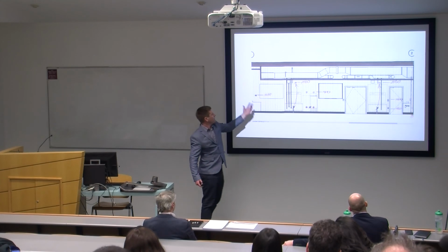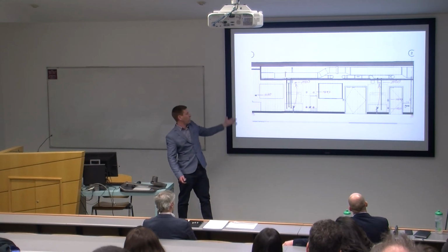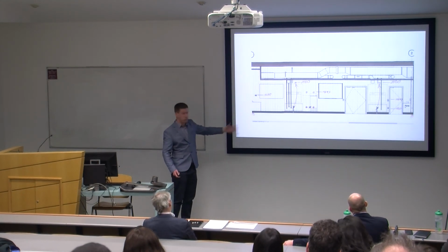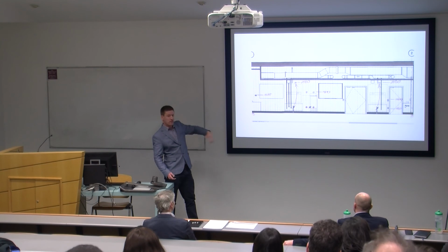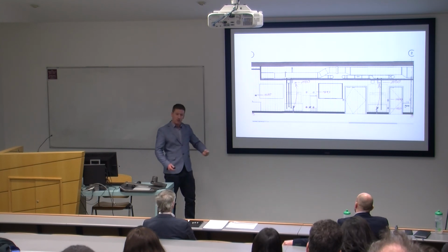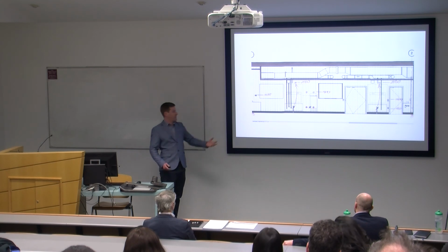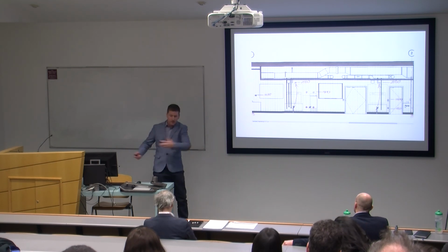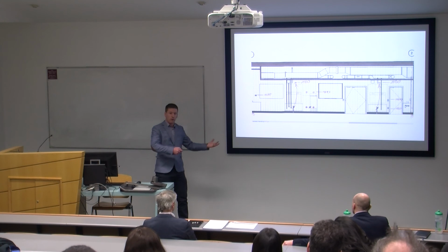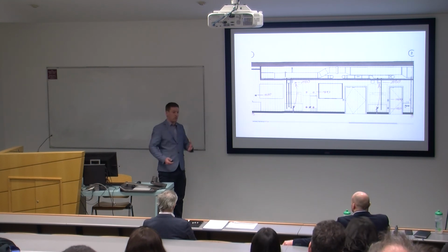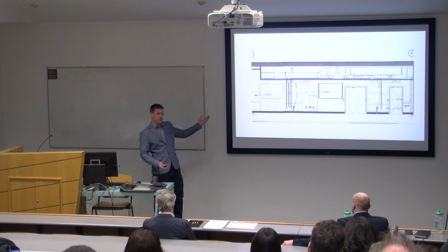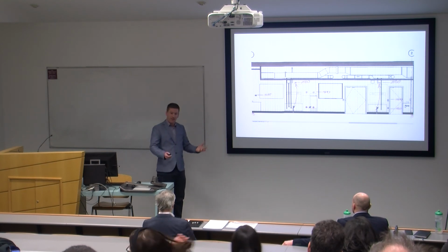This only represents one of a lot of different rooms, and it's actually one of the less complicated rooms. And when you actually go to different contractors and the different requirements you need, you find out you have to do a lot of changing. And then when it comes to quantity surveyors and getting contractors on board, a lot of them might be late on board, and say they're providing kitchen units and stuff like that. They go, actually no, our unit is twice the size of what you have in the model there. So you have to